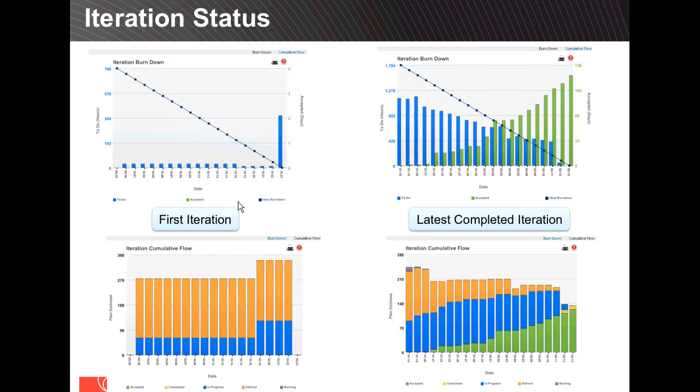We actually view it not only as planning, but as a design tool as well. So the rule of thumb is if you cannot break a story into at least one great task in 15 minutes, it's a story complete. That's a great metric, and that's a great thing to learn at the beginning of the iteration, as opposed to in the middle or towards the end of the iteration.